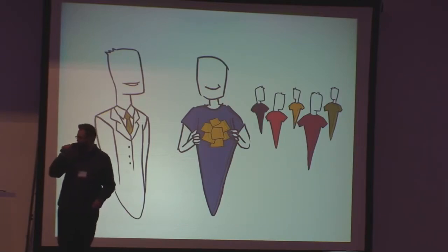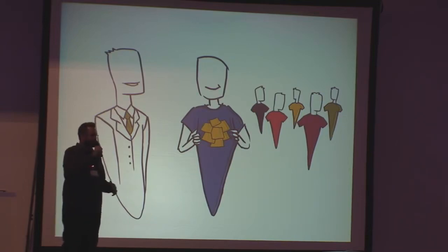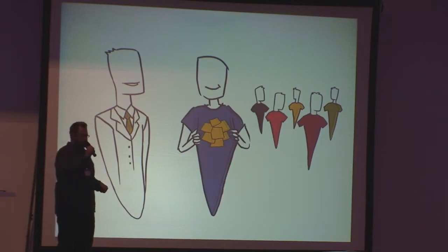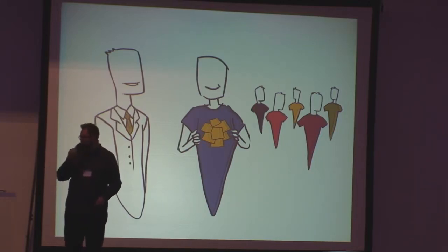Second is the Scrum Master. So while the product owner is focused on the product, the Scrum Master is more focused on the team, and specifically the process the team is using, making sure they're adhering to the rules of Scrum, and facilitating meetings, making sure everything's going smoothly. They can also be involved in helping remove blockers.